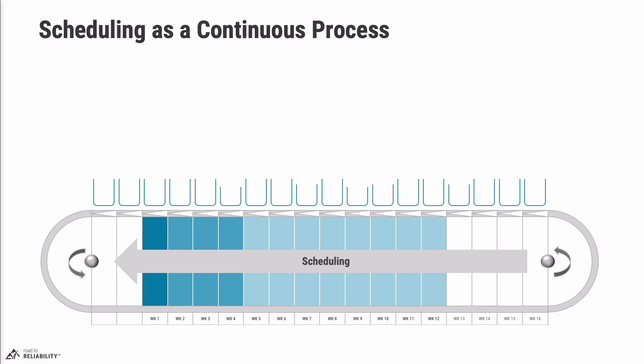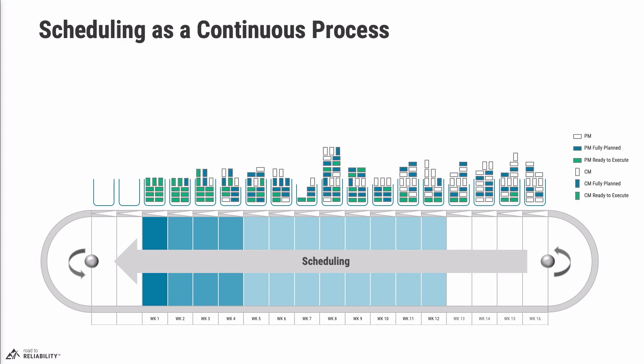As a scheduler, it is your job to fill these weekly buckets with maintenance work orders. The weekly buckets are now partially filled, overfilled, or perfectly filled with work orders. The horizontal blocks are PMs and the vertical blocks are CMs. White blocks represent work orders that still require planning, blue blocks are work that is fully planned, and green blocks are work that is ready to execute. Those statuses are maintained by the planner, but it's down to the scheduler to make sure the work is sitting in the right bucket — within any constraints set by the planner, such as a job that cannot start before week 8.